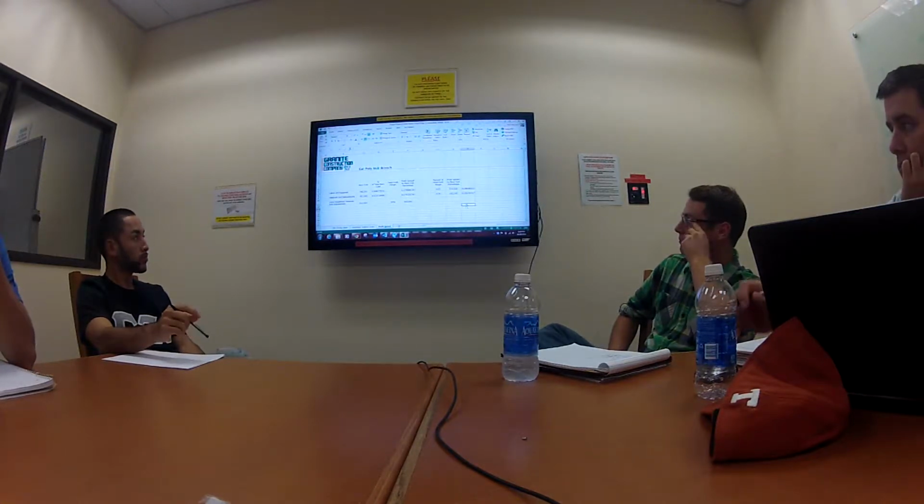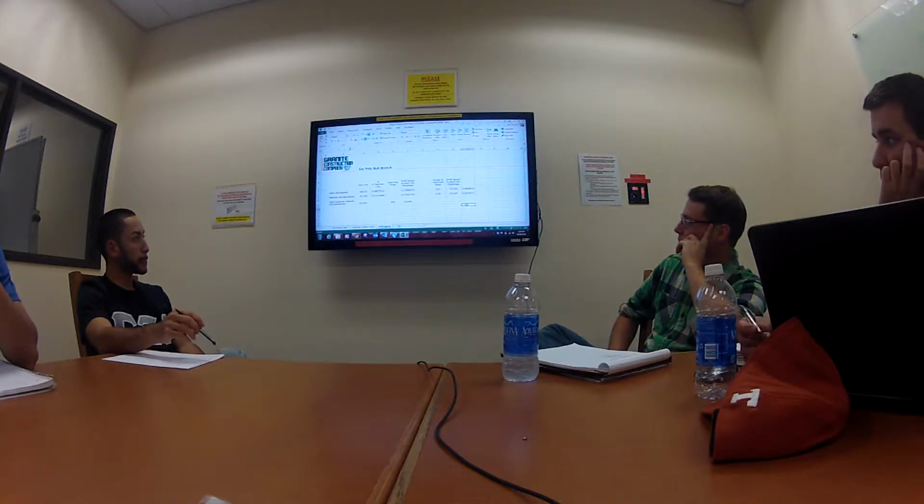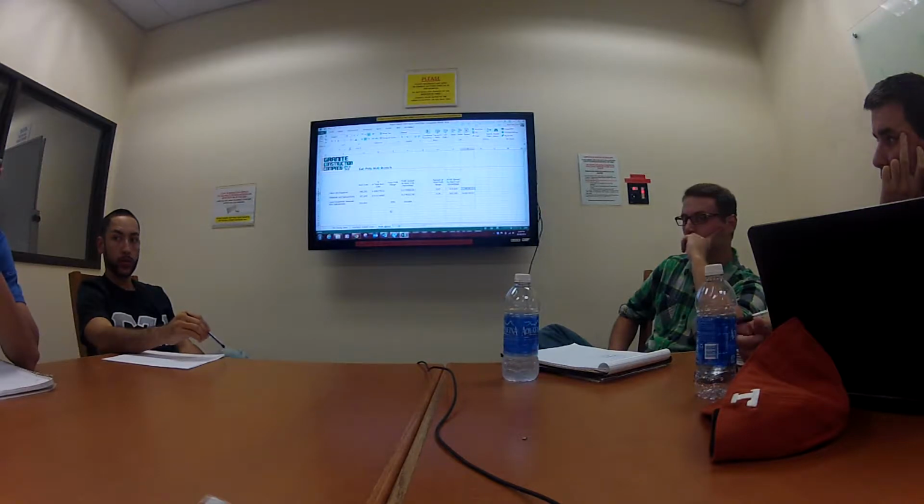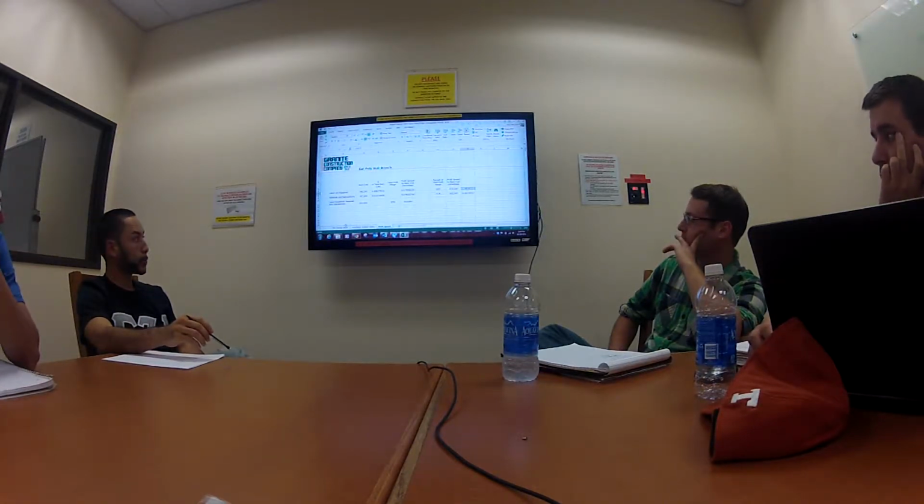And so what that ended up giving me was 48 cents per dollar of bare cost is what the markup needed to be on it, or maybe that's a percentage. I don't remember. So that number is tied over into the bid closing sheet, and for each dollar that was in one of those columns for labor and equipment, it gets hit with that factor, and that's how you come up with it.